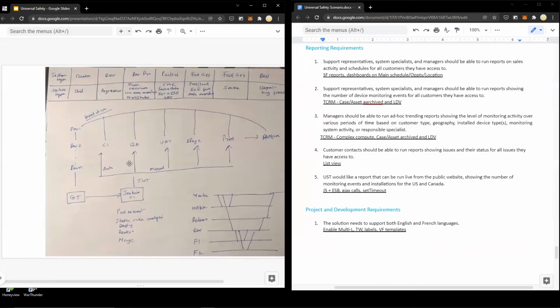Can you talk a little bit more about what exactly the Moscow framework is? Sure, it's primarily used for backlog prioritization. MoSCoW basically stands for the needs within the project, which are must-haves, should-haves, could-haves, and won't-haves at all. Our backlog can then be prioritized based on that, and it gives an output of the things we need to work on as priority.